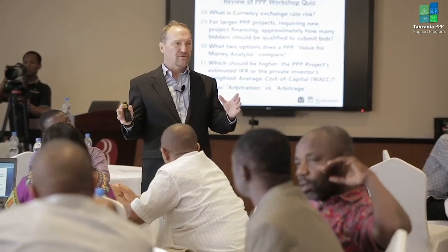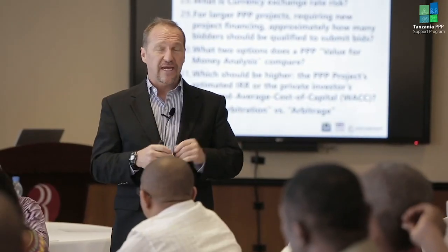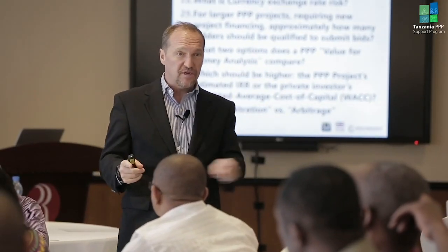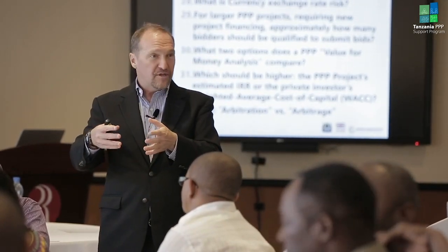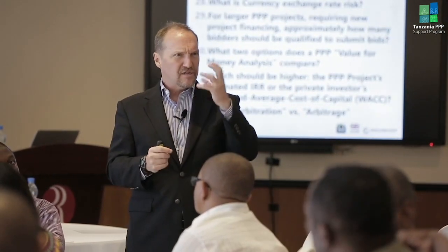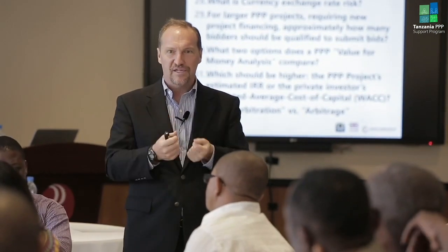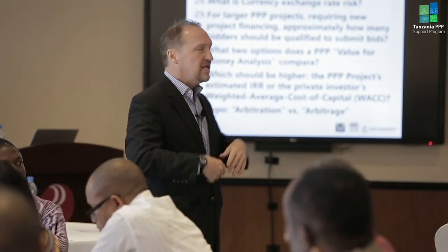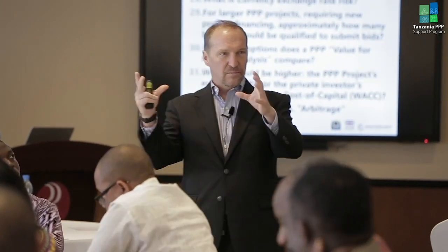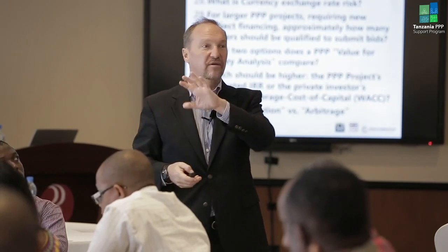Yes. Tomorrow, when we talk about contract management and performance monitoring, John will be talking with us about arbitration as an effective, efficient, can even be confidential, quick way of solving a dispute. Anytime you get a large project over a long period of time, lots of different stakeholders and lots of money, it's normal that you'll expect there'll be some disputes because the consequences of the dispute are costly. One party will say, we think we did. The other party will say, we think you didn't. Got to find a way to solve it. Arbitration is a way, as they mentioned, you appoint an independent arbitrator. That is arbitration.